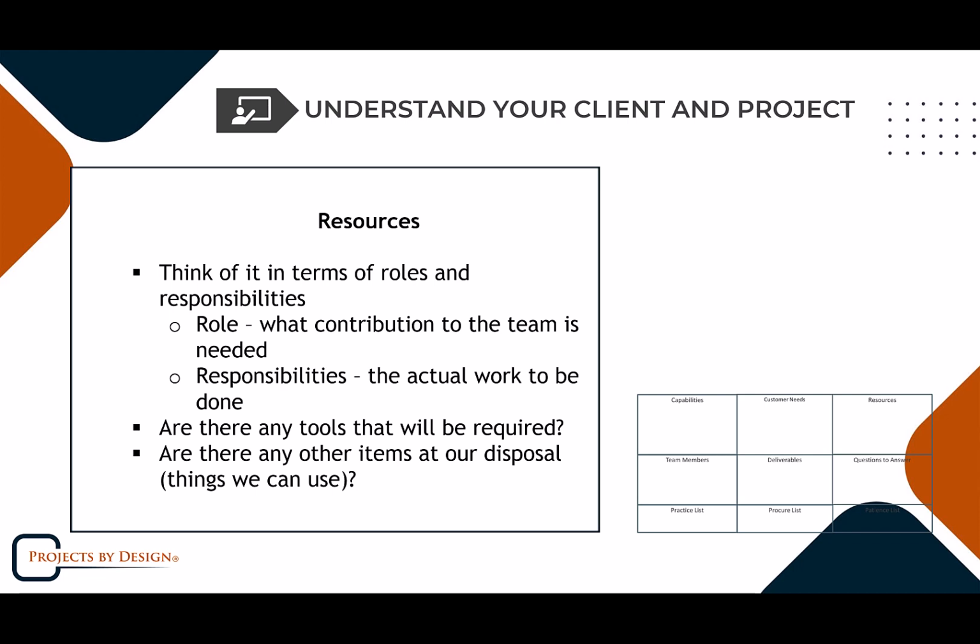And again, this is not the same thing as a project charter, right? You may say on the project charter, we have the project organization, the project team defined, and so on and so forth. We may or may not have names to the roles when we need to do our initial planning. And certainly at the portfolio level or program level, there's a high probability you won't have names to the roles because you want that done once the project is initialized. So that's why at that program level, we're looking at just the list of the resources. And is there a timeline the customer requires? We call that a resource, but what it is, is a resource constraint.